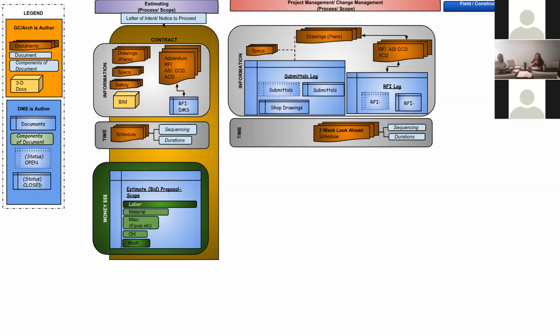If mold grows into the wall, it may take weeks or months until it becomes visible. And if there's tenants or a school, if there's any mold that's in the air, they may have to demo whole sections again and redo stuff at the time of class. So they're very sensitive about those things in trying to sequence it. They want to go as fast as they can. At the same time, there's some risks, but they want to mitigate those risks and be able to do that. So knowing where our schedule's at and where things are happening is another critical component to looking at a project and maintaining.